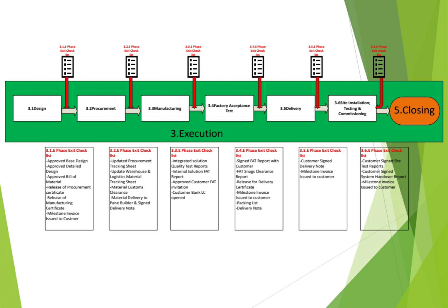So here the phase exit of this procurement. We have an update of the procurement tracking sheet done by the procurement team to highlight the expected material delivery dates, the cost of each material. This is a very important file which helps the project managers also in their estimate to complete or the planning of their budget every month. Also we'll share samples of this.